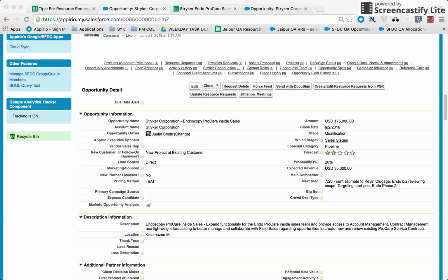The second thumb rule is that all the information we populate or share with the help of resource requests is concise, short, and very precise. For example, if we require an integration resource from the offshore team, we need to make sure we have the accurate region for this offshore demand, and we choose the accurate practice for this integration demand.